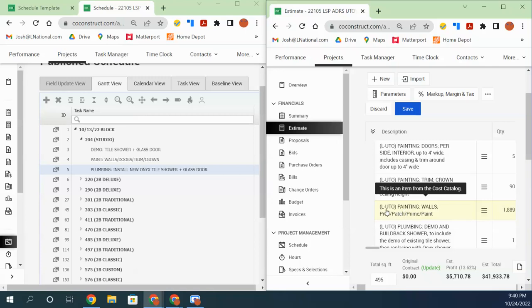So it would be, furnish and install or something like that. These schedule items are labor items. They're not material items. So you want to make sure that there's no material mentioned other than if specifically needed to describe the task. There should be no material in your schedule.